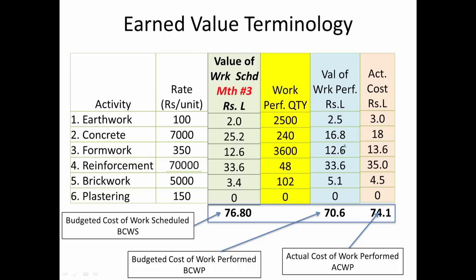A similar comparison of value of work performed versus actual cost shows where variances are occurring. In this case, brickwork has actually yielded more value than was spent. But in almost all other cases, we have spent marginally more than the value of work done. We might want to look at the package level, analyze why this is happening, and take control actions.